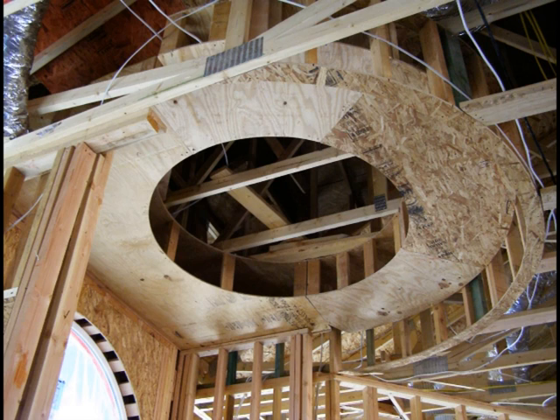In this photo, you see what we call a drop ceiling. It is very important that all drop ceilings are complete so you can mount any lighting boxes or switched outlets for things like rope lighting or LED special effects.